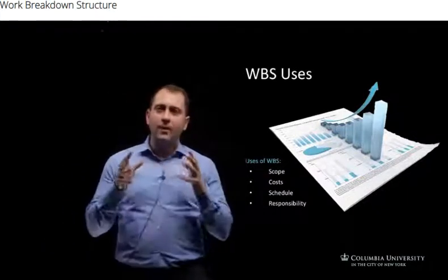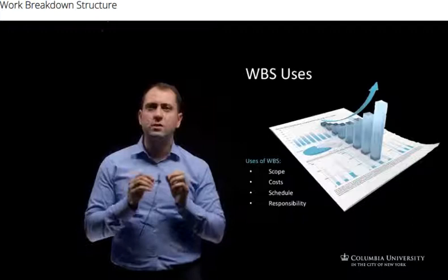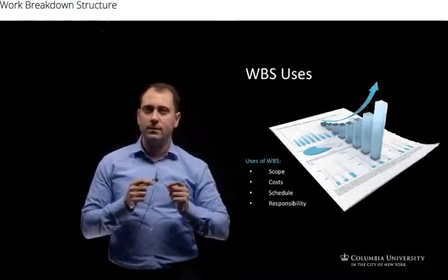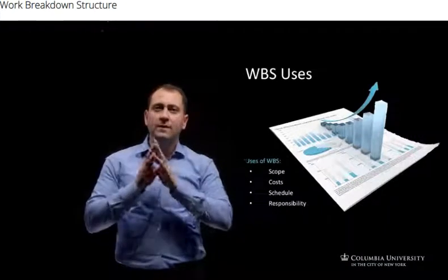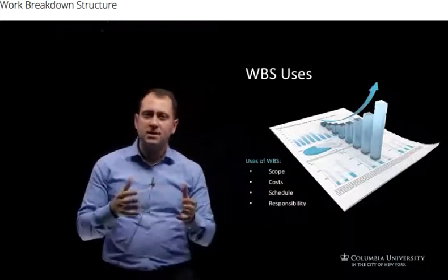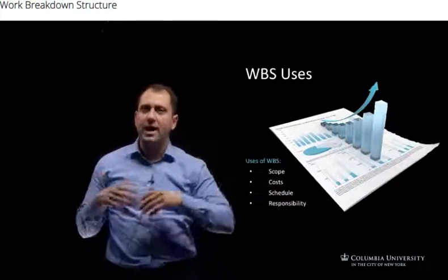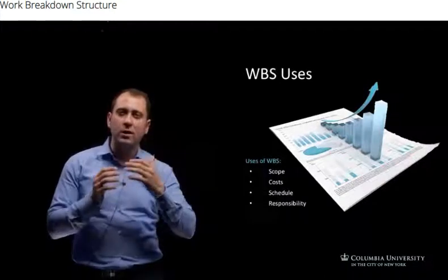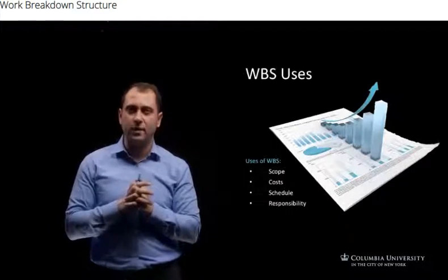Cost. The work packages of the WBS are measurable, as I mentioned, which will help construction managers assign specific costs to a task or activity. This will also let managers distribute the project budget into the defined packages, which link to the construction tasks. This process is very important in cost control, as I mentioned about the earned value method, and in schedule control, to make sure that we are not exceeding the total project cost or going over the schedule that we assigned for this specific project.